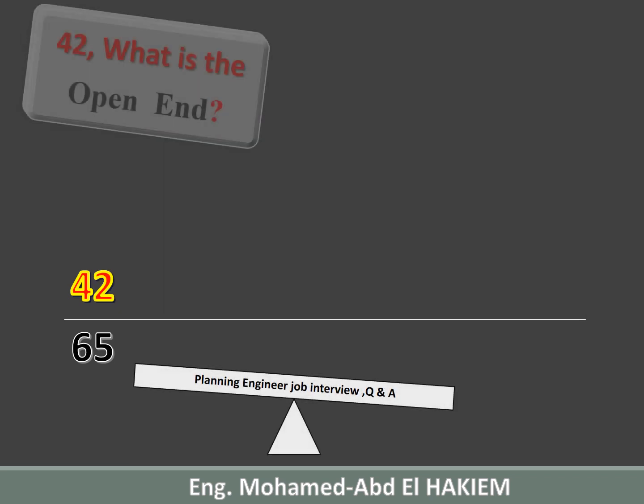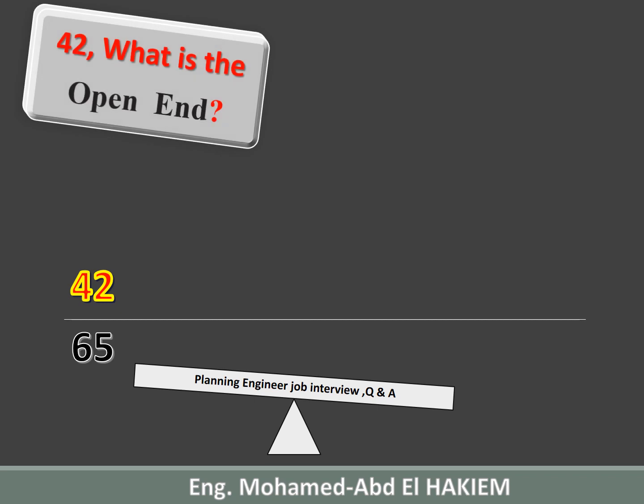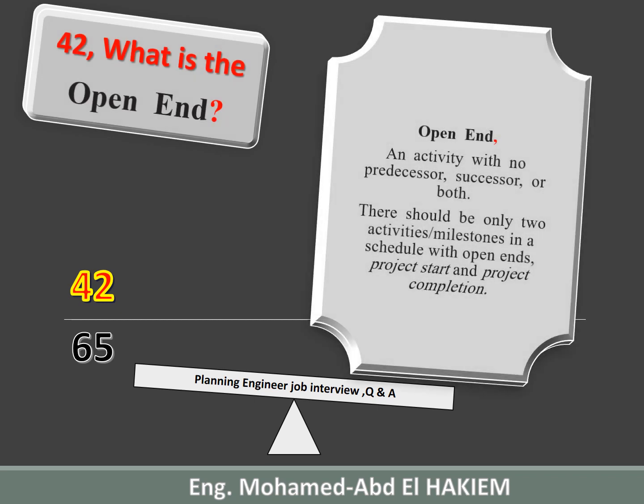42. What is the open end? Open end is an activity with no predecessor, successor, or both. There should be only two activities/milestones in a schedule with open ends, project start and project completion.